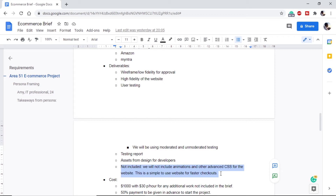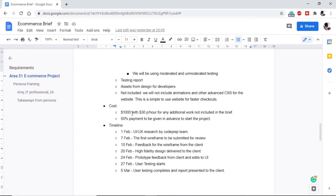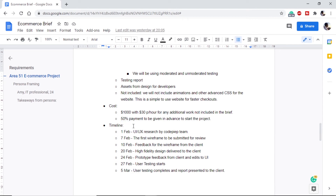We will also state what we are not including — for example, animations and advanced CSS for the website. Note that this brief is specific to UI design, so when doing just the UI design part, we exclude animations and advanced CSS. However, in our case, we are also acting as the developer. Moving on, the brief includes the budget decided with the client, and if the client wants to add something not listed in deliverables, we let them know it will cost extra. That's why deliverables are very important. We also include the advance payment percentage and project timeline.